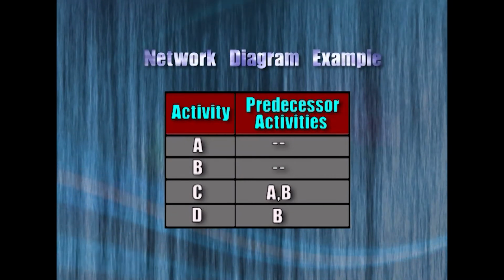Fine. Coming back to what we were saying, there are precedence relationships. Certain activities need to be completed before certain activities can begin. And again, there are subsequent or following activities. Just as there are preceding activities, there are activities following certain activities. Like, for example, setting up machinery is in fact an activity that would follow setting up of the foundation or the building. Okay. So what are the preceding activities for any activity? What are the activities following an activity? We have to generate that relationship in the form of some kind of a table. And what are the concurrent activities?